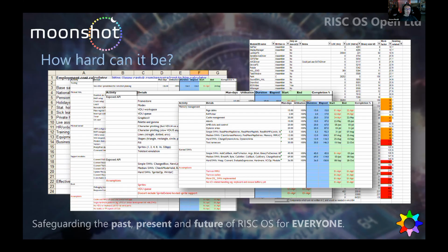And it's assuming that there are people working on this who aren't all geniuses. They're not able to just churn out code a module a day. They're going to have a learning curve. They're going to have to get familiar with tools. They're going to run into issues with tools and need to sort those out. So there's a lot of work. And that's why we came to this figure. But because there's a lot of work, you can divide and conquer into lots of little bits and incremental steps that are useful and valuable.